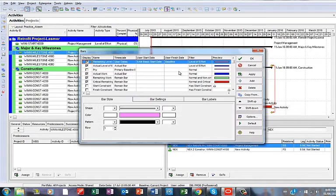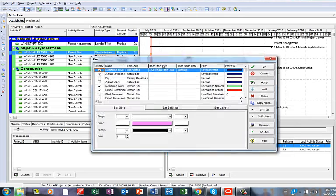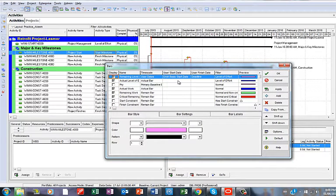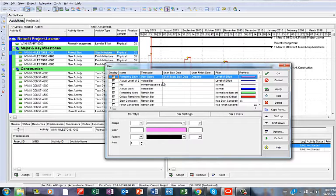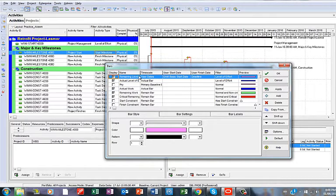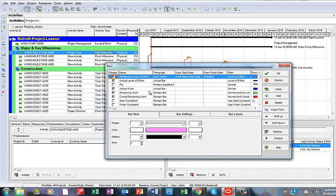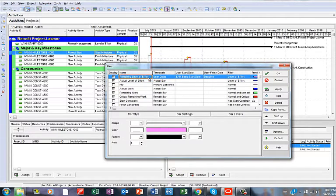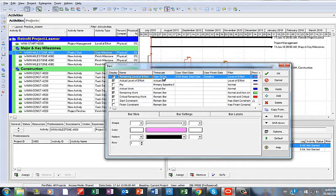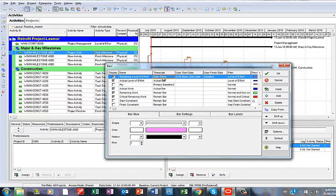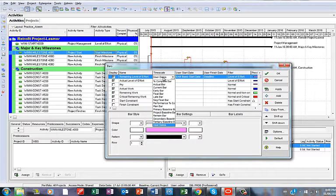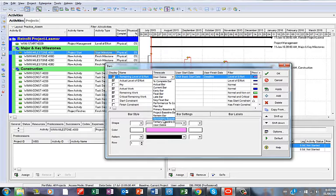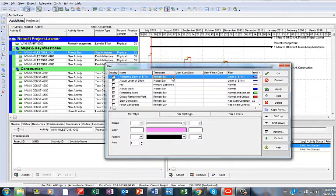When you get on the bar wizard, what you just need to do is look up here. You see Remaining Level of Effort. So next to it under the Time Scale, the default is User Dates. What you just need to do precisely is change this into Remain Bar.